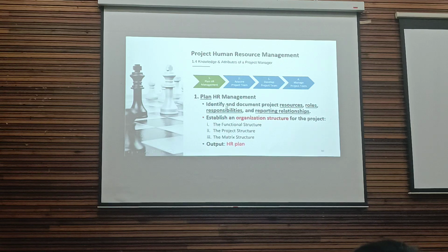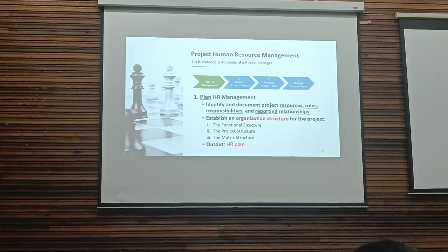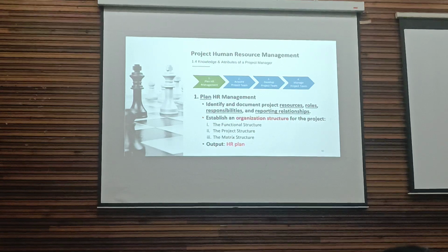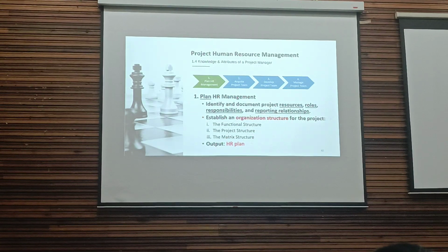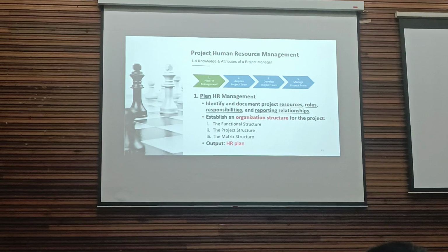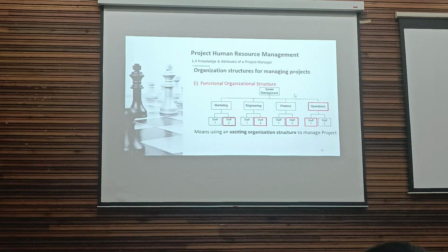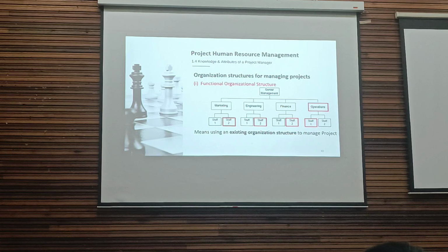Establish an organization structure for the project. So if you are doing a project, there's a project manager, you have team members. You may have many team members, you can group them, developers, QA, tester, put them into different groups and put them in a hierarchy. So the output from here is the HR plan, the organization structure for managing the project.